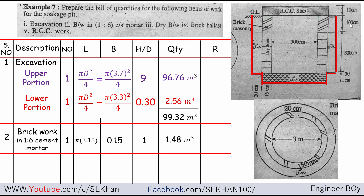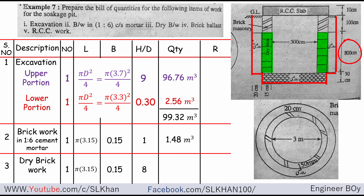Item number three is dry brickwork. The diameter for dry brickwork is the same as for the 1:6 cement brickwork — the wall circumference and diameter are the same for both types of brickwork. So: one item, pi times 3.15 for the circumference, breadth of 0.15 m, times height of 8 m (800 cm). Multiplying these gives the dry brickwork quantity of 11.87 cubic meters.